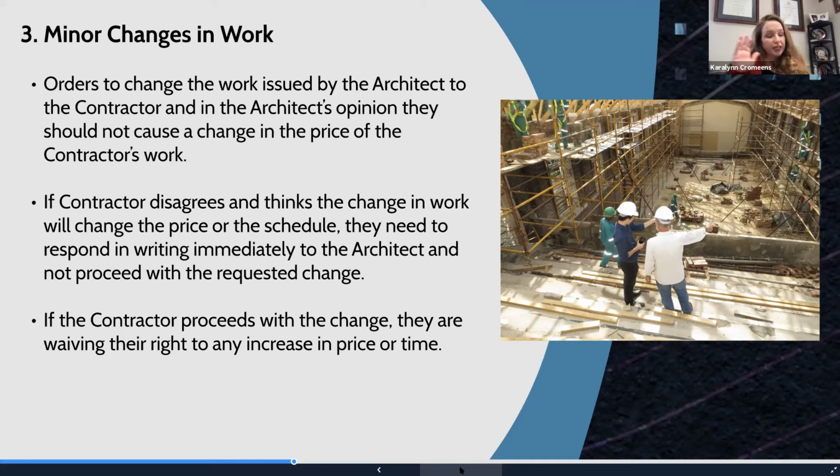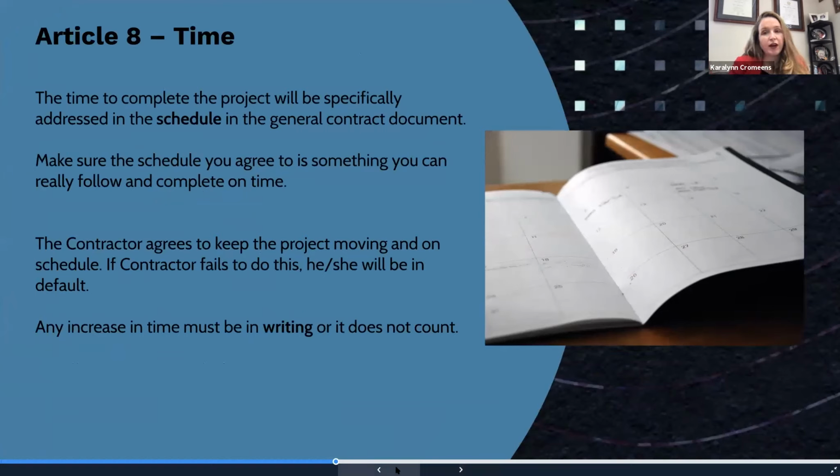The main thing with any of this, the request for extra work or all of that, make sure you have great written documents, emails, daily reports, something that's showing what's going on in the written version at the time it's going on. If a dispute does arise, that is important stuff to have later on that your attorney would love to have. "He told me to do this, or she told me to do this, and then they would pay me" wouldn't be enforceable if you have a written contract.